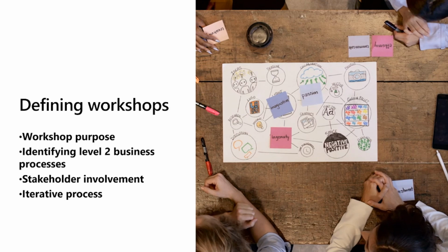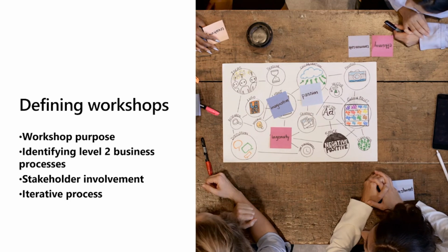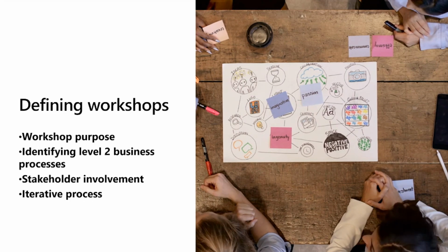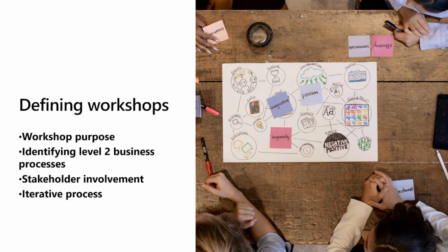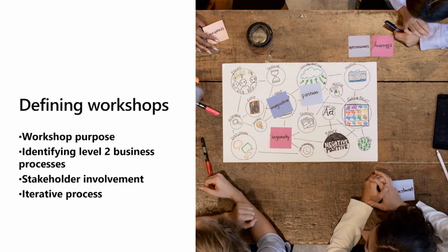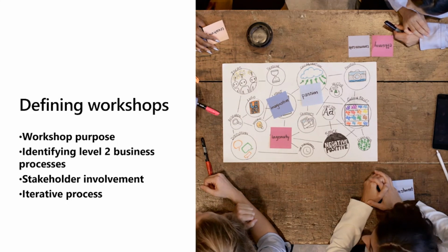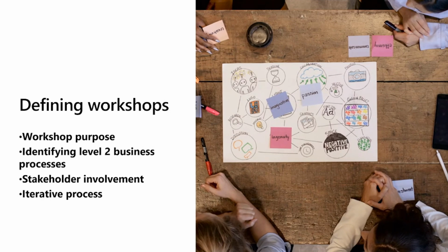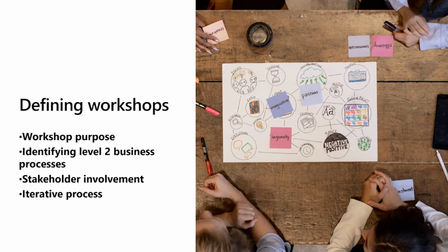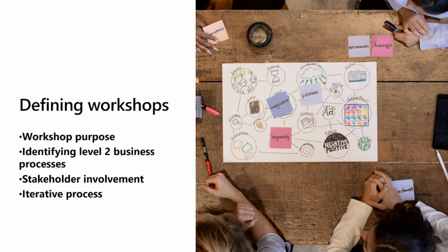So those initial workshops are like discovery workshops and might have one structure, whereas later in your project, the design workshops and testing workshops are going to have more detail. So that's the kind of process that we recommend at a high level. We'll have more tech talks in the future to talk about that. But if you want to include workshops, you can add a custom work item type into your Azure DevOps and insert rows into your spreadsheet to represent those workshops.